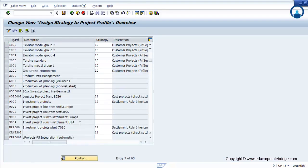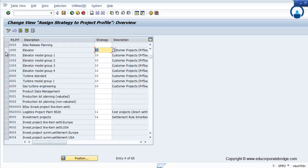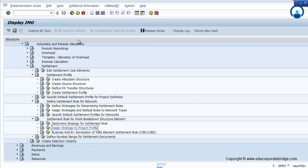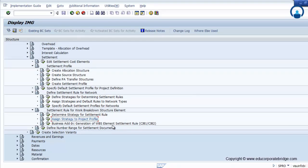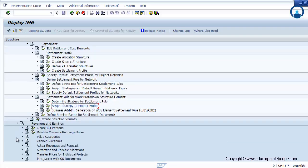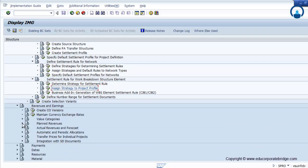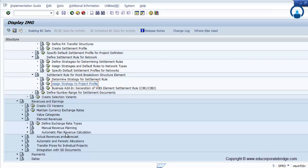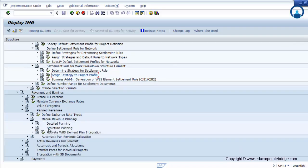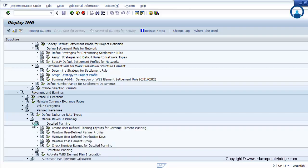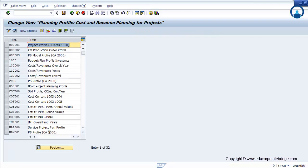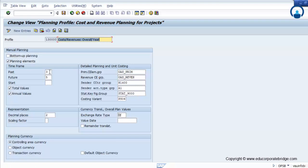Finally, assign the settlement profile strategy to the project profile. Now, revenue is nothing but the revenue coming from the customer. Same way as cost planning, there is revenue planning. You have to maintain the revenue planning across the particular WBS.